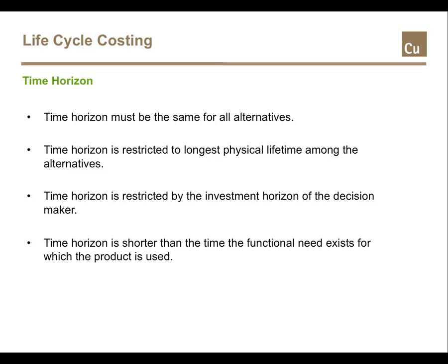Some companies have a standard investment analysis period, for example 3, 5 or 10 years. Companies that are subject to considerable risks will generally have a shorter investment horizon than companies in a very stable business setting. The time horizon is shorter than the functional lifetime, which is the total time period that the functional need exists for which the product is used.